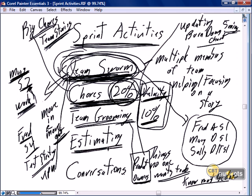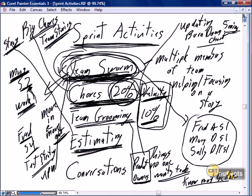Depending on your strategy, the team may or may not need to build time for estimating. In our last nugget on estimating, I suggested we have a story for estimating — a repeating or continuous story — to allow time for the team to do estimating, probably not in every sprint but every two or three sprints, we bring out the estimating story. That's my recommended way of dealing with estimating. But a lot of sprints don't use the specific estimating story, in which case we simply need to ensure there's time built into the overall velocity to allow the team to assign the appropriate story points to each story.